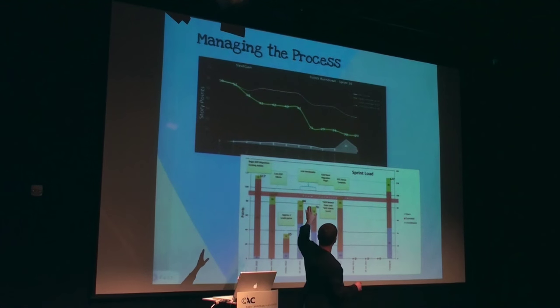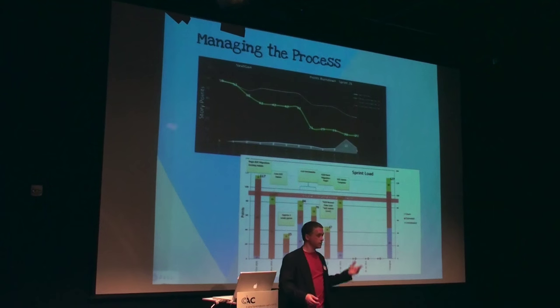More than likely, while they're all stuck at 42 there, the person who's responsible for testing is gone. She shows up on the 5th and gets a whole bunch of stuff tested in one day, and now it falls. But we're showing real time what's going on. So we're not going to gradually draw that line down to the 23. We're going to be transparent and explain to management that so-and-so was gone during that time.